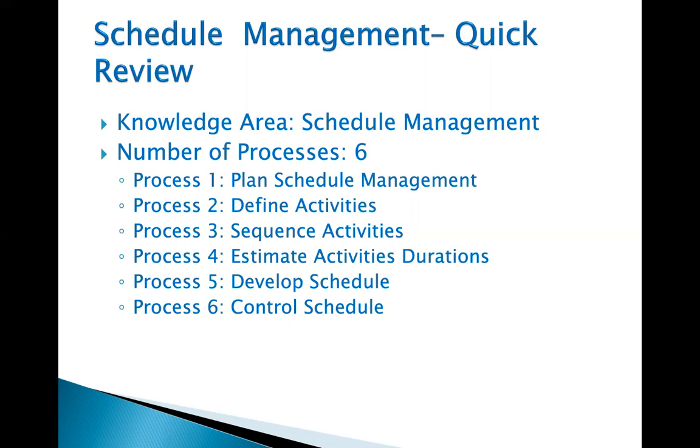When we are developing the schedule, the most important thing is to create the schedule baseline, which is the document or the artifact that we will need in order to control the project. Also, if we need to change anything in that schedule, we need to submit a change request to the change control board.